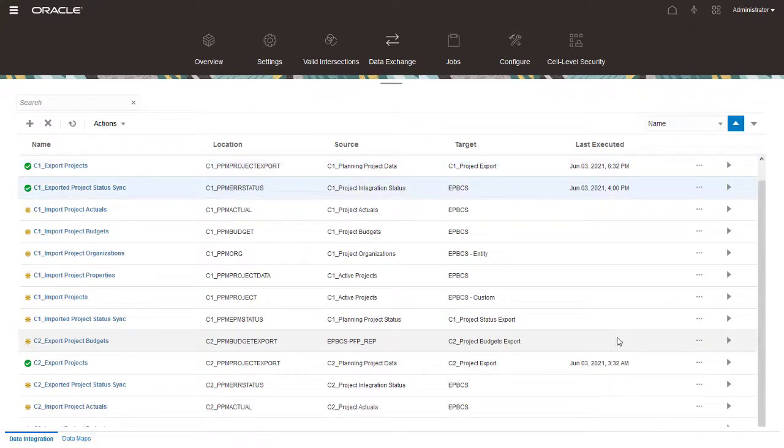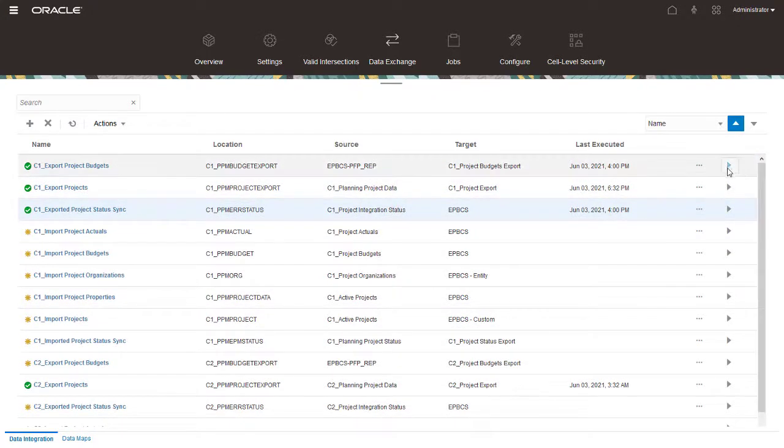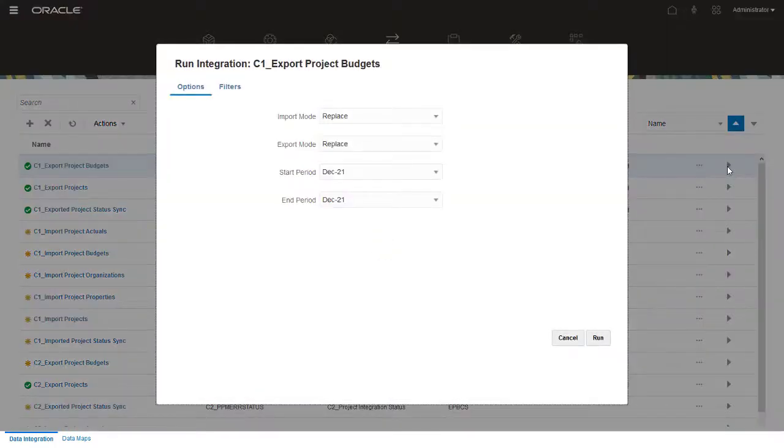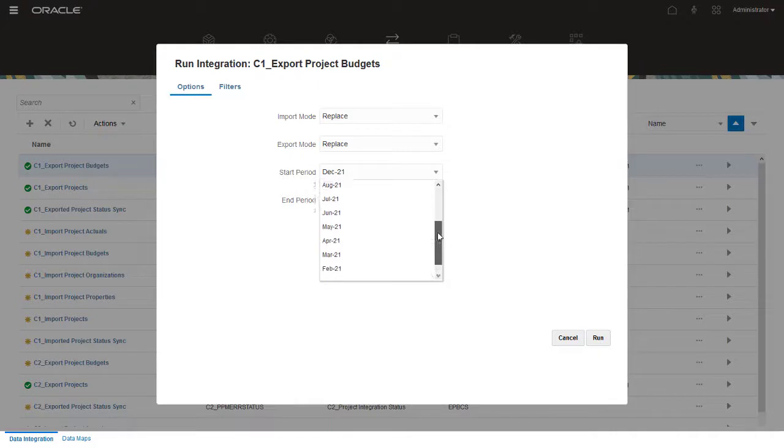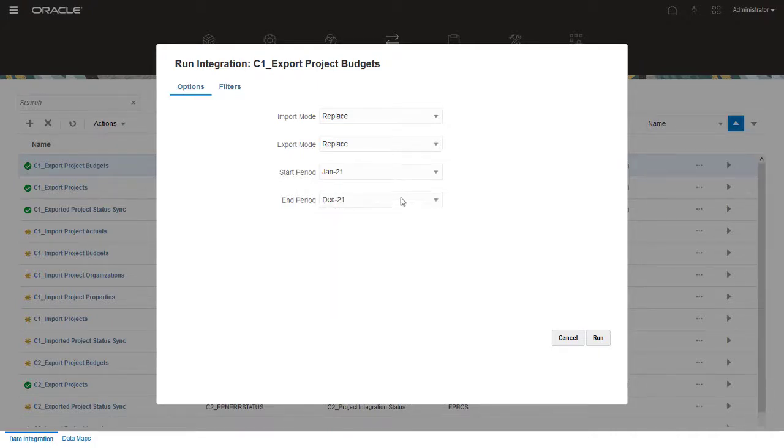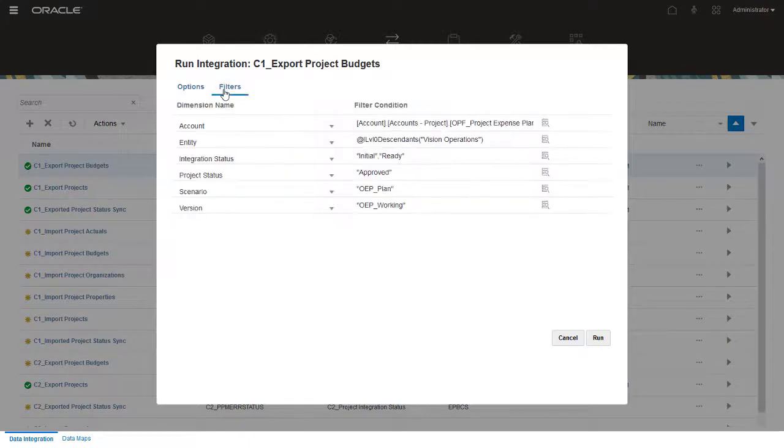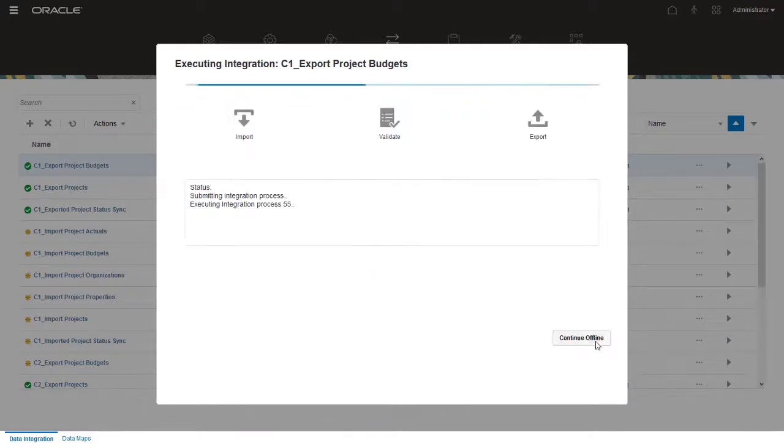Next, run the Export Project Budgets Integration Job to push your project budget from EPM Planning to Project Management. Select the time periods you want to export. On the Filters tab, you can change the defaults to export a different version, scenario, entity, and so on. I'll keep the defaults, and run the integration.